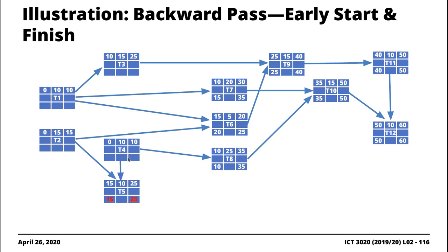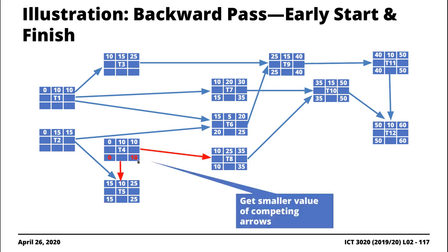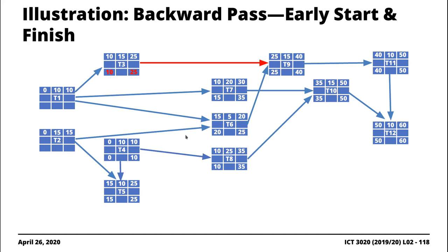For T4, two tasks depend on it. During the backward pass, when multiple tasks depend on an activity, take the minimum of the late start dates of those successor tasks. The minimum between 10 and 15 is 10, so we bring 10 here. For T3, one arrow points forward, so we just bring 25. For T2, two tasks depend on it; minimum between 20 and 15 is 15; subtract 15 from 15 to get zero. For T1, three tasks depend on it — T3, T7, and T6; minimum between 20, 15, and 10 is 10; subtract 10 from 10 to get zero. The backward pass is now complete.